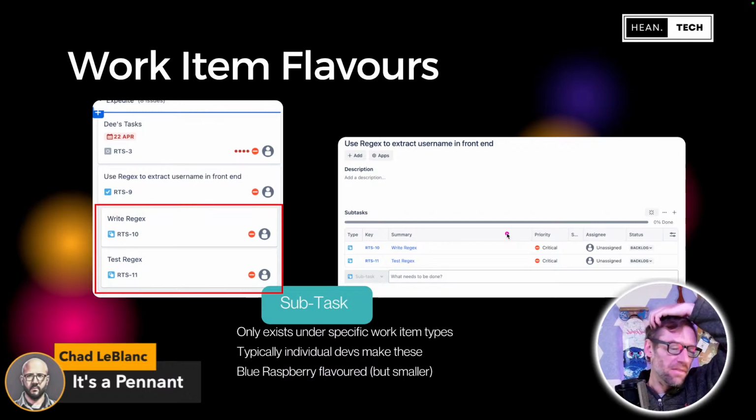I typically let my developers build subtasks if they need them. So this would be breaking down one chunk. So in my example of the work item scheme, I as a developer might develop a new work item scheme and a subtask, talk to users about their needs, a subtask, draw it out on a whiteboard, a subtask, build it in our demo box. So the subtask allows developers to break things down if they need to.